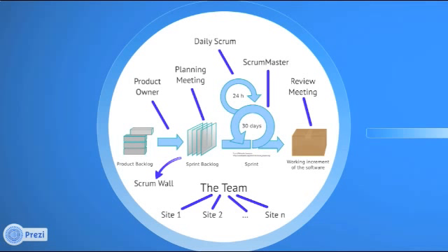They want everybody in the daily Scrum, so if you have multiple sites, they all have the daily meeting at the same time, and everybody's in it at once. The sprints should be shorter for distributed Scrum, because there's more to go wrong. Rely more on automated testing. The product backlog should be shared. Everybody's got the same product backlog, but if you have developers in 3 different sites, it can be useful to have separate sprint backlogs for each sub-team.